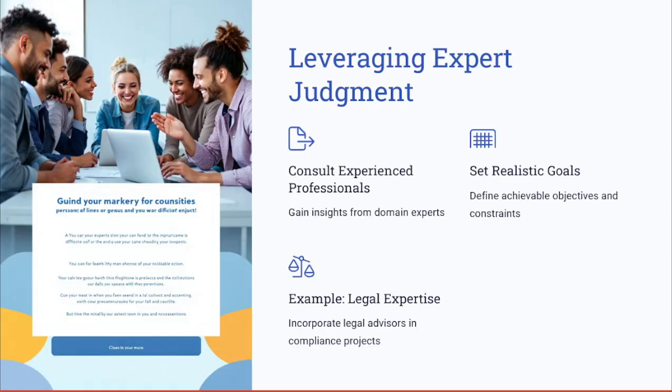Leveraging the expert judgment. Expert judgment involves seeking insights from experienced professionals who have relevant knowledge of the project domain. Their expertise ensures that the project objectives are realistic, constraints are well defined, and potential pitfalls are identified and mitigated. For example, in a compliance-driven project, involving legal advisors early ensures that the regulatory requirements are understood and integrated in the project scope.